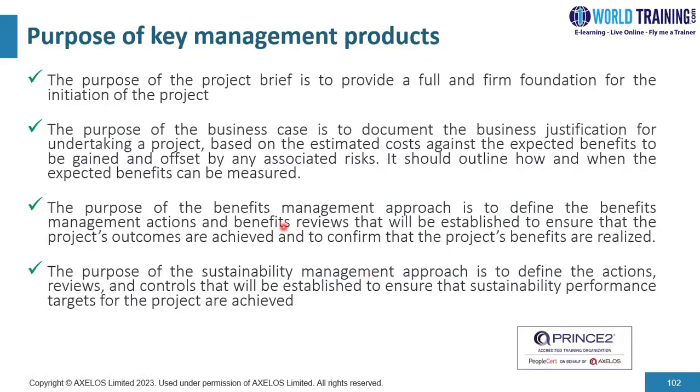Moving on, let's look into the key management products that are relevant to the business case theme and what is the purpose of these documents. Now, one of the key documents is the project brief document. The purpose of the brief document is to provide a full and firm foundation for the initiation of the project. The purpose of the business case is to document the business justification for undertaking a project based on the estimated costs against the expected benefits to be gained and offset by any associated risks. It should outline how and when the expected benefits can be measured.